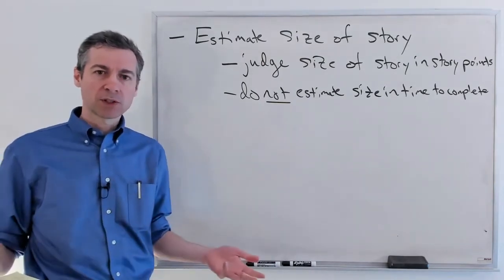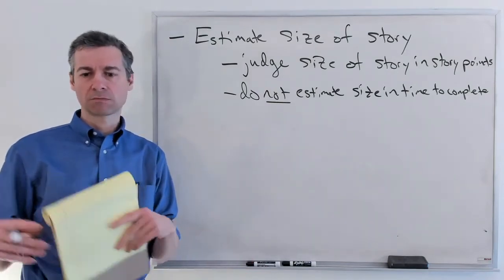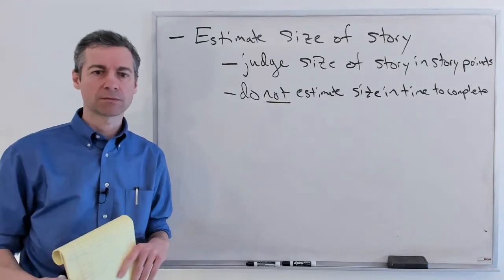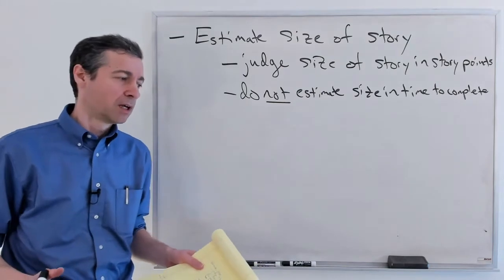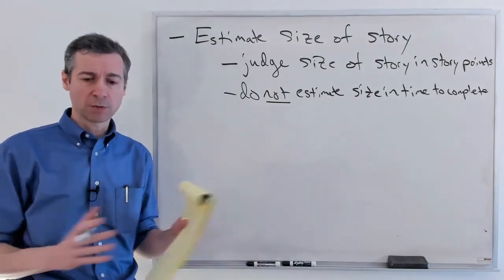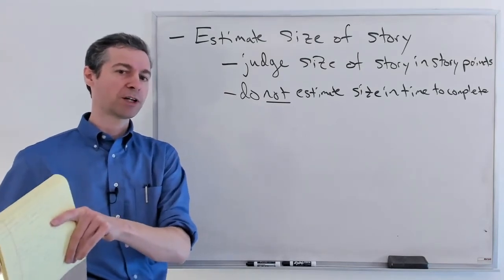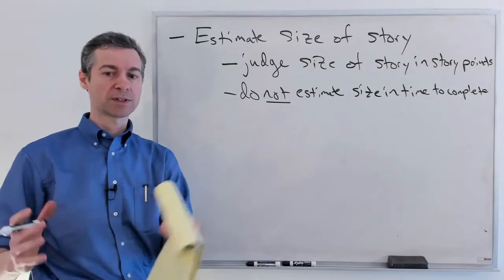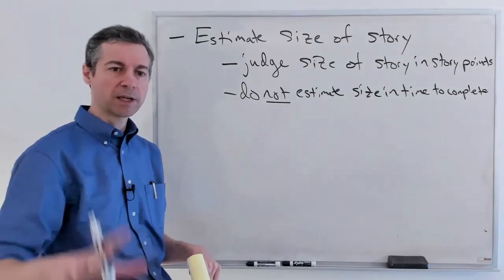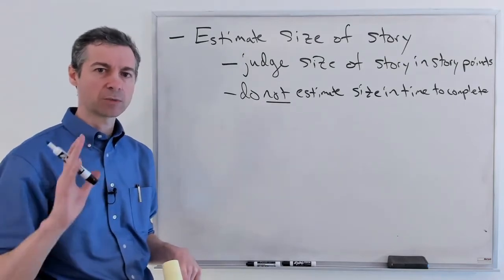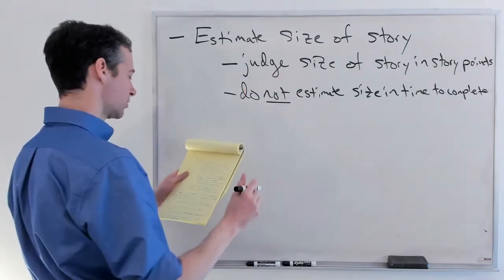you would come up with your estimates for a project, and it's all going to happen like this, and you'd miss the deadlines. You'd run over. You'd have what we'd call a slip in the project. So then people were always careful. They always leave a buffer period at the end of the project to make sure that for all those slips, they'll still get the work done on time. It's a disaster. Planning by time is not something that works well in software. And so instead, we work by these estimates of story points.